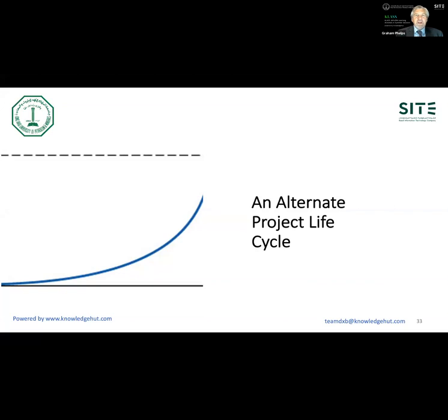We're going to change completely the way HR is managed in an organization of 20,000 people. So the first sprint would be to define management expectations and reporting needs. Amongst the senior managers in the business, we take a 1 week process and we deep dive into their expectations. Takes a week, bang.